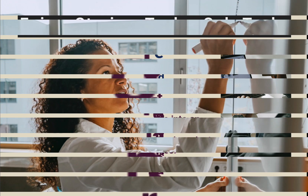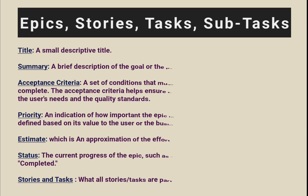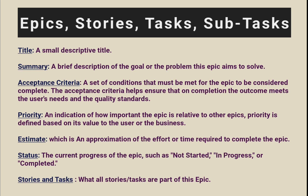Typically, an epic should include the following information. Title: a short descriptive title. Summary: a brief description about the goal of the epic or the problem this epic aims to solve. Third, acceptance criteria: a set of conditions that must be met for the epic to be considered complete. The acceptance criteria helps ensure that on completion the outcome meets the user's needs and quality standards.